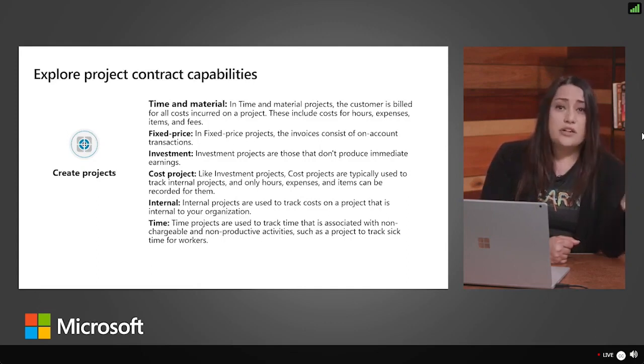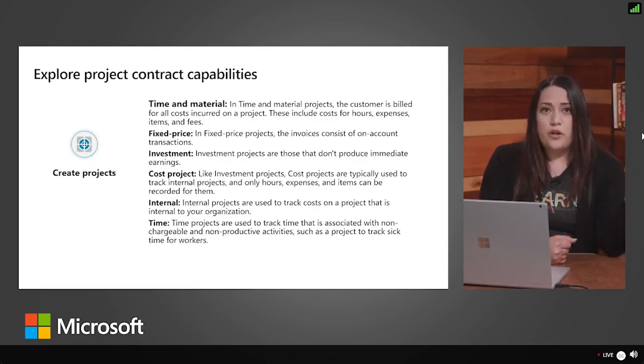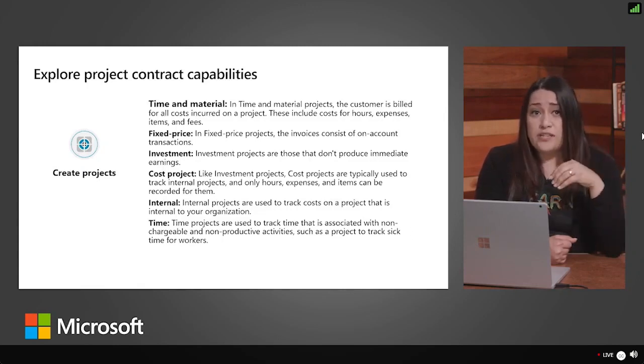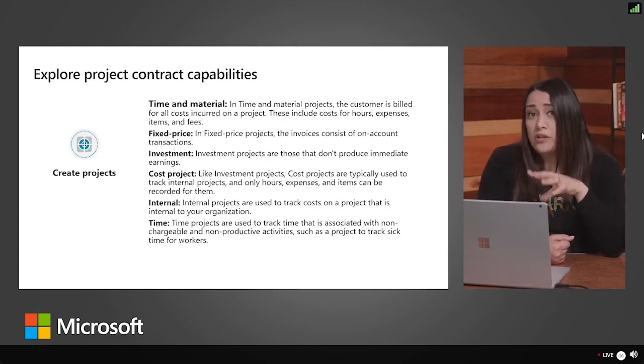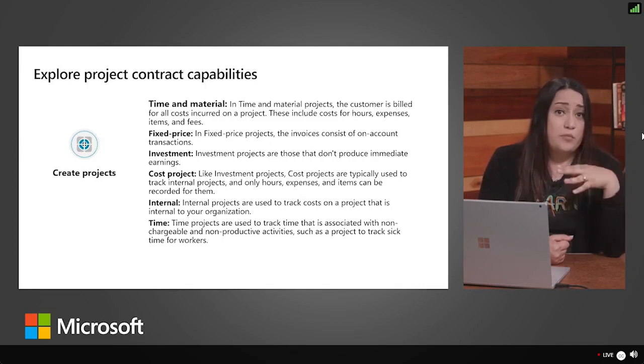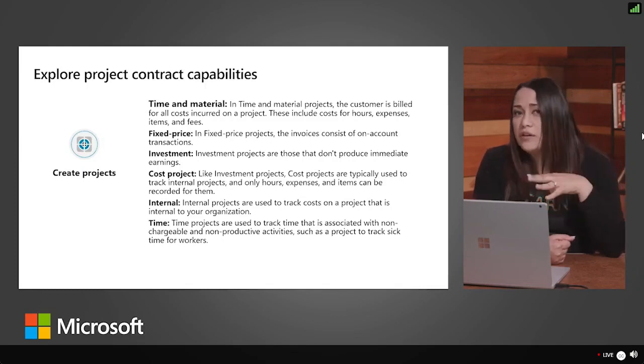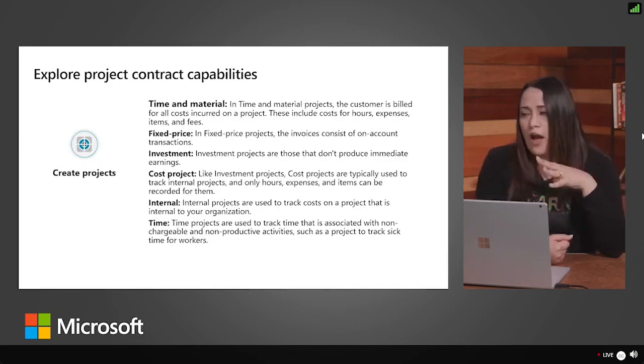But they're not necessarily working on a billable project. Since their utilization needs to be tracked, we can use this if we needed to pull resources for another project. When employees are booking time to this non-billable project, they're going to appear as utilized, so you don't have to worry about overbooking them for other projects.